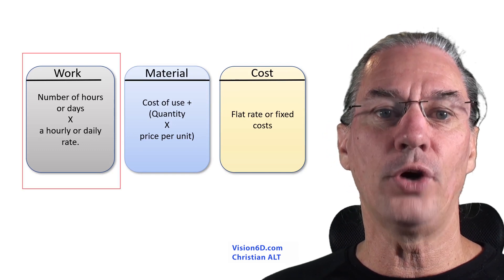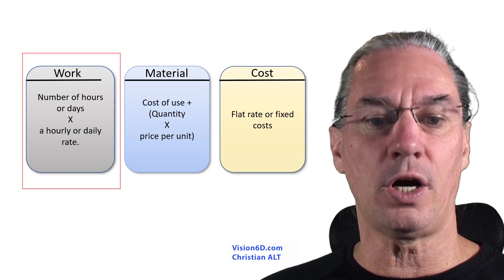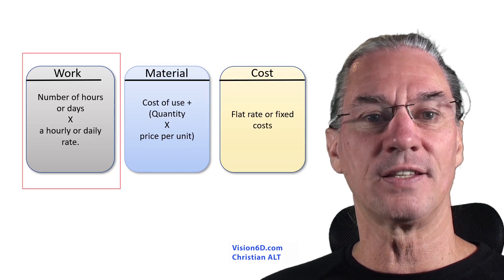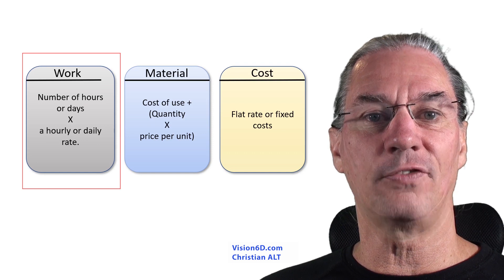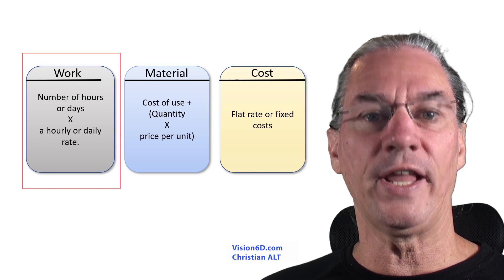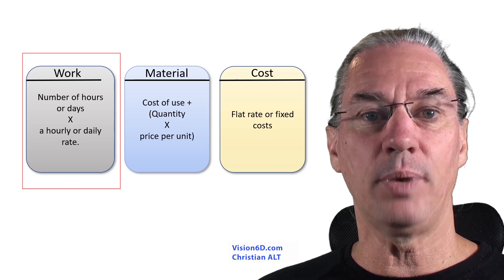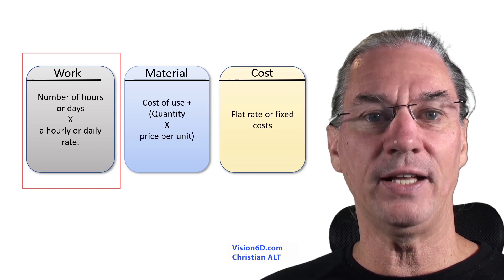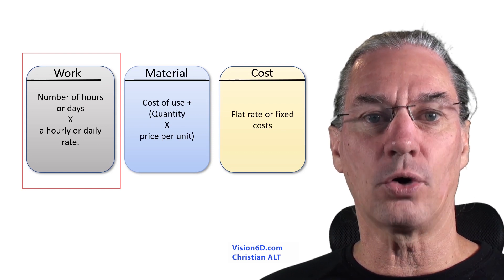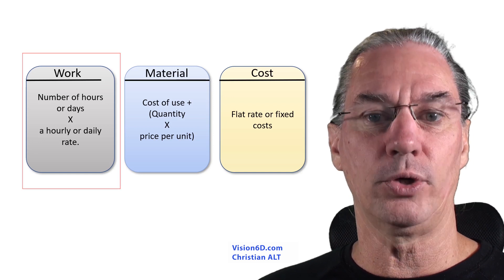First of all, you have the work costs. It's the number of hours or number of days multiplied by the daily rate or an hourly rate.